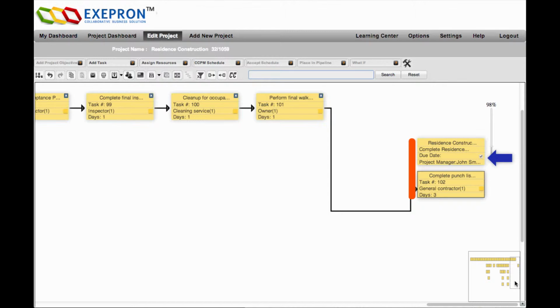Scheduling an aggressive project due date. In certain environments, a schedule with an earlier or more aggressive project due date may be required. This will result in a partially penetrated project buffer, which will increase the scheduling and execution risk for this project. This will be reflected by the project risk quotient.